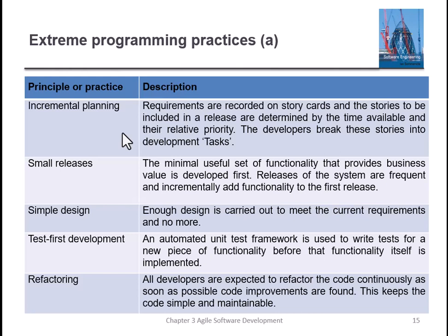So small releases: the minimal useful set of functionality that provides business value is developed first. So this means, as I stated earlier, based on the prioritization policy, you should release first those requirements or tasks that are more beneficial for the business of clients. Releases of the system are frequent and incrementally add functionality to the first release. Simple design: enough design is carried out to meet the current requirements and no more.